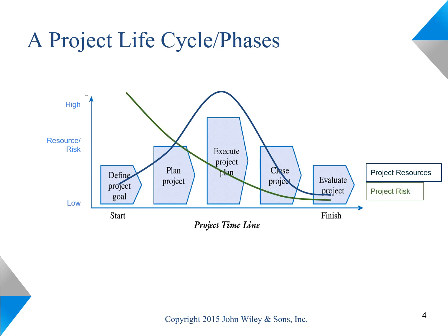Now let's look at the risk. The risk associated with the project is continually reduced as we address the unknowns of the project. So it's the highest at the beginning of the project and it's minimal when we're finishing the project.